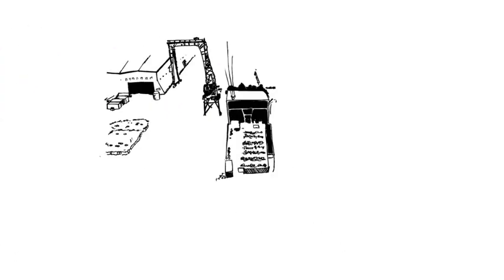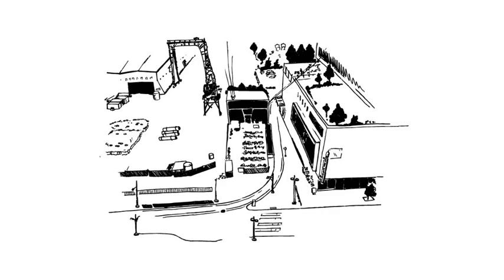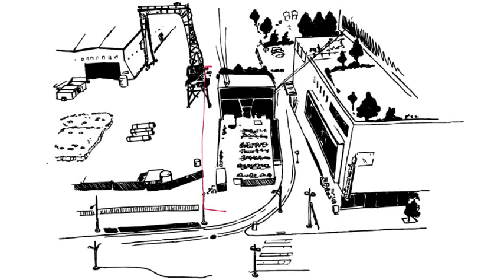All pedestrian traffic will be rerouted to a new tram Kohler Pavilion connector bridge. The two tram cabins will be set on the ground. Finally, all the staging equipment and materials will be set in place at both terminals.